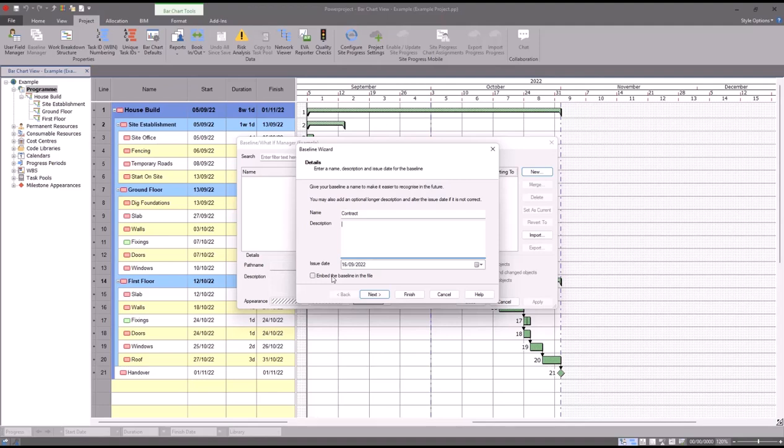Instead what you'd want to do is keep this unticked, and what it will do then is it will create a separate file. So you'll have the live project file and then you'll have the baseline file as two separate files, but in the same folder, still on your C drive or your network drive wherever you're storing it. What I'm going to do in this example is I'm going to tick this box to embed the baseline.